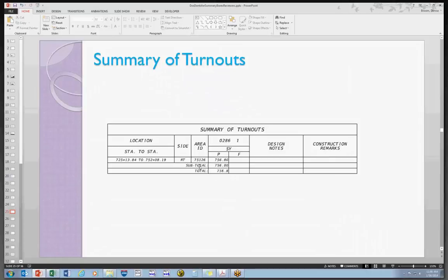One thing that you may see, I just thought of this, is that if they were using the early summary boxes, you'll see in here that all you see for the ones that total down is a subtotal, and then a total. The total is on the first summary box for that quantity, and then each subsequent summary box has a subtotal at the bottom.